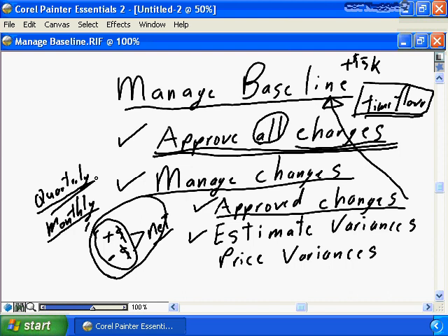Are we going to accept the fact the project is going to cost more? Are we going to change the scope of the project to bring the costs in line, deliver less functionality? Or are we going to change the timeline, if that is appropriate for adjusting the variance, saying I no longer have to pay overtime, or I can bring in less expensive staff and do the same work over more time? But what are you going to do about your estimate variances once you have accumulated all the pluses and minuses and have a more realistic understanding of what the new project costs are going to be?